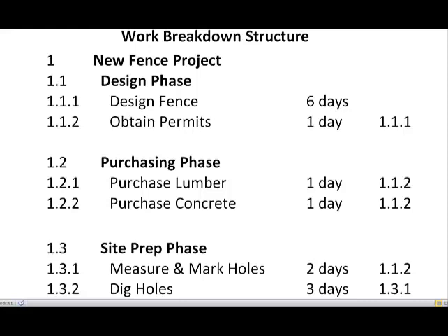Once again, we start with a design phase, and underneath the design phase are two tasks, 1.1.1, which is design the fence, and 1.1.2, which is obtain permits.